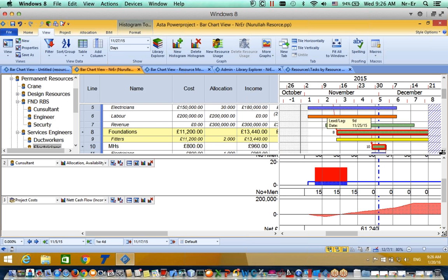And to avoid this, I am just delaying some activities a few days, and I am seeing the direct reflection, and my cash flow is going to be plus. I am delaying 1 to 3 days, and as you see my net cash flow is going to be positive.